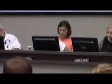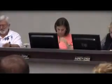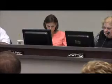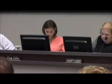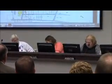Essentially, what this is showing is the school has asked us to design the new school entirely while keeping the existing school operational. So the best opportunity to do that would be to develop the building itself and everything at the rear of the new facility, including the stormwater and erosion control, to facilitate that.